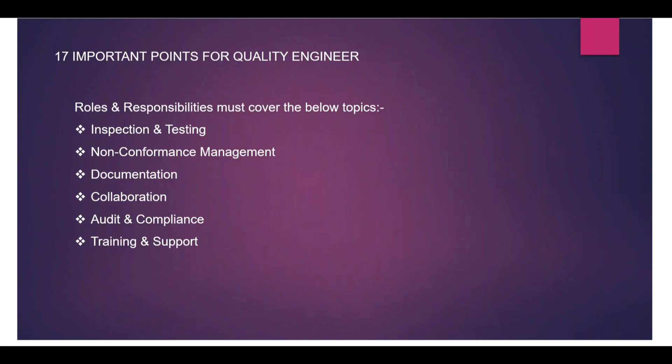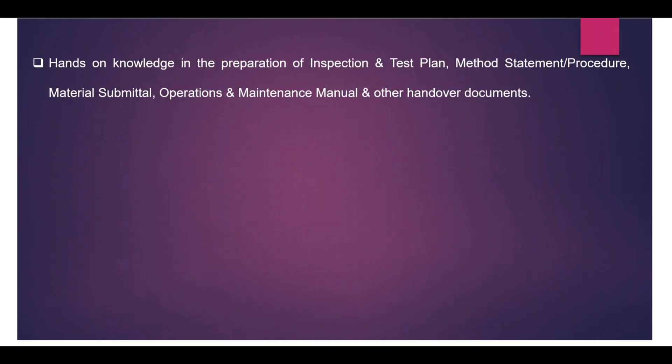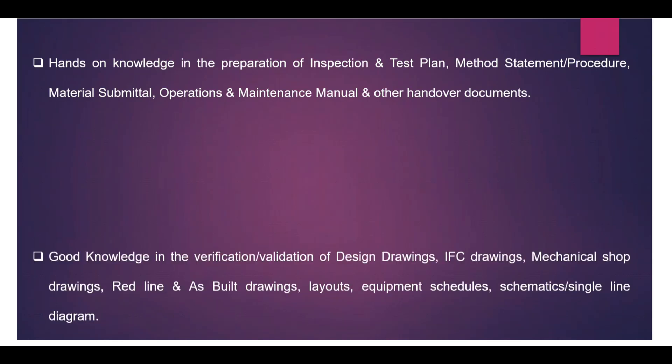The first requirement for a quality engineer is hands-on knowledge in the preparation of ITP (Inspection and Test Plan), method statements for all activities or procedures, material submittals for all materials, operation and maintenance manuals, and other handover documents. This is one of the very important points related to a quality control engineer.